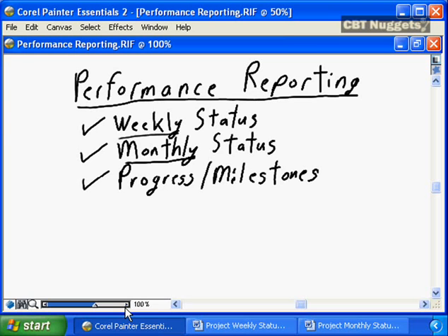So it is an interim, high-level, virtual milestone status report that says here are the key milestones, 5, 6, or 7 for your project, and here's how we're doing, so that other stakeholders, other people who are interested in the project, can have a high-level view of the project and of how well the project is doing, and more importantly, have that high-level view of when the project will be completed for the organization.